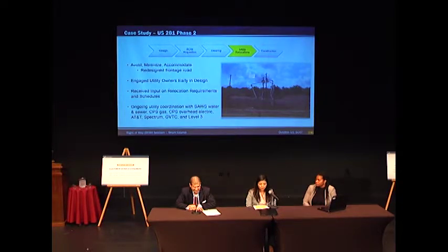So we asked for that schedule broken down by the priority phasing on the right-of-way acquisition and the vegetation clearing. And we're also including the telecom schedules, because as we know, it's not just the overhead electric power poles that get relocated. You also have pole attachers that also need time to relocate their facilities.